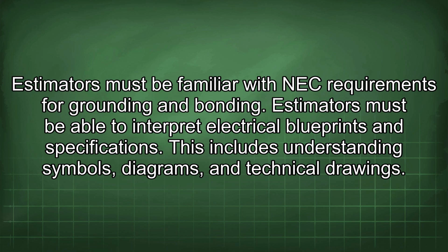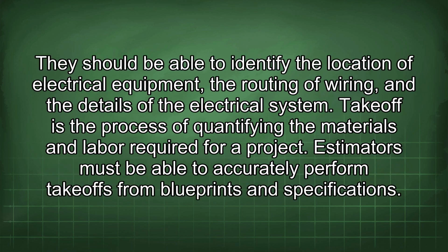Estimators must be able to interpret electrical blueprints and specifications. This includes understanding symbols, diagrams, and technical drawings. They should be able to identify the location of electrical equipment, the routing of wiring, and the details of the electrical system. Takeoff is the process of quantifying the materials and labor required for a project.